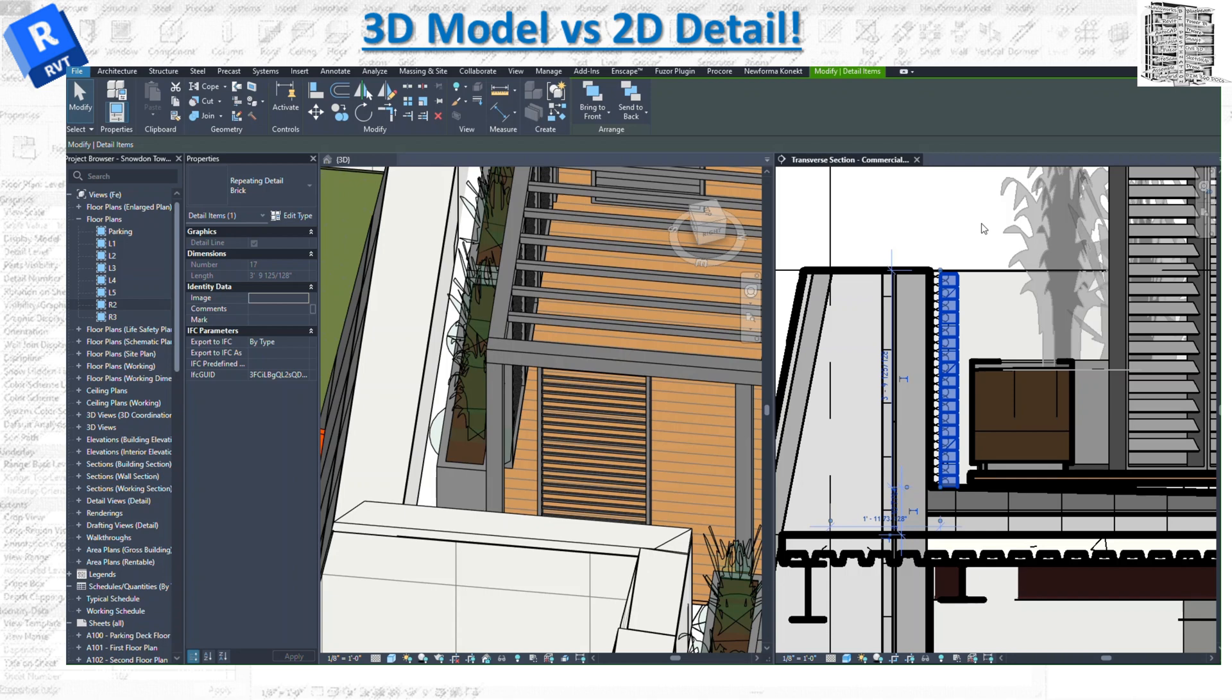That's why the documents are the main source for the coordination and the modeling. So none of the subs or the detailers can go and just use the background model, architectural model or whatnot, and say I'm modeling based on that. Note the reference resource would be the drawings, and you can use this as a background or QC check for some of the areas. You can get the grids and whatnot, but exactly these are the type of details that you might miss if you are not using the drawing and go to the 2D.